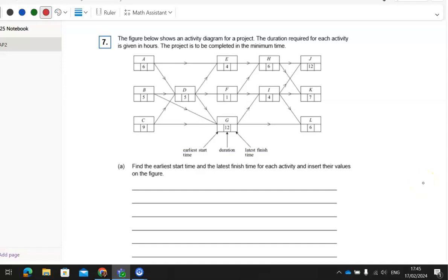Okay, critical path analysis, here we go. So the activities that aren't dependent on anything are A, B and C. So we can say that they all are going to start at 0. Keep now going forward. They all feed into D.